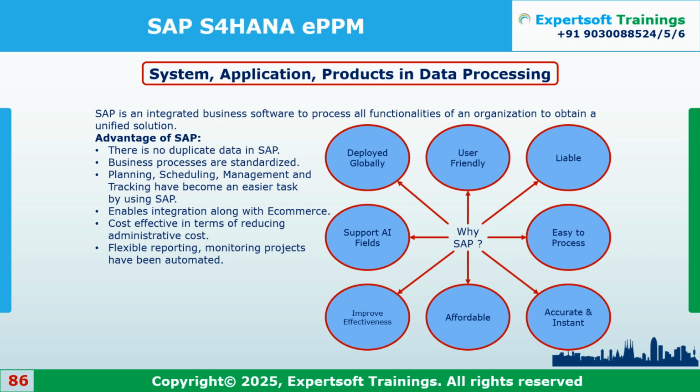So like that, you have to prepare some master data for every module. They have different master data. First, you have to do the configurations. Based on the configuration, you have to create all this master data. Then the business transactions can happen. What the end user will do is simply open his relevant activities. He will select the WBS, put in that customer, and create a sales order based on the WBS. Similarly, based on the WBS, he might create some PR or a PO.